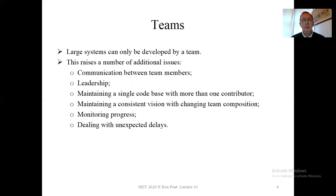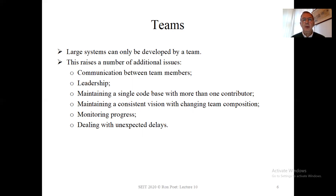Monitoring progress — how do we know that our project is working well? There's an old adage in software engineering: the first 90% of the work takes the first 90% of the time, and the second 90% of the work takes the second 90% of the time. As a rule of thumb, things take twice as long as you expect. We want to avoid the problem where everything seems fine week after week, and then the week before the deadline we discover a big problem. Software projects seldom go smoothly — there's a high likelihood of unexpected delays, so we need a process in place for dealing with them.